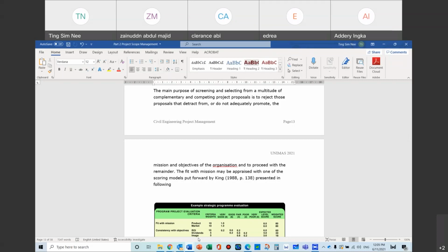So when this initial screening is done via feasibility studies, the outcome and the content of the feasibility studies are given in the notes. Once you've done that, you are already answering the question, is the project going to be possible? If it's possible, the next thing you need to look at is, is it going to be viable? And that is where your financial analysis comes in, meaning how is the company's cash flow, how the project will be spending money, how fast the project will be spending money, how fast will you be getting return from it, how much profit you're going to get out of it.